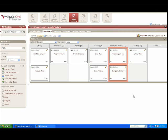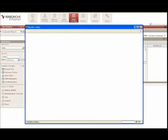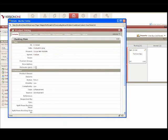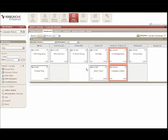A couple more tool-focused questions. Someone asked about the sizing of different work units. As you're creating features, you can put an estimate on each of your features or backlog items. Once you've entered your estimate, you can see that estimate on your storyboard — that was the number we were seeing: 2, 1, 1, 2. Stephan also asked an interesting question about the work-in-progress limit — it's doing it based on a count of items in a certain state, not on the total amount of estimate in a state. That is correct — the work-in-progress limits really are expecting a small amount of variability.